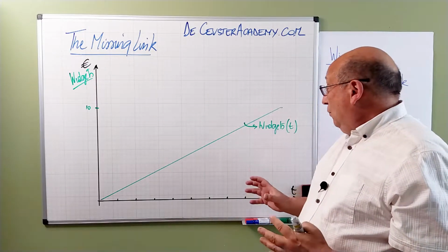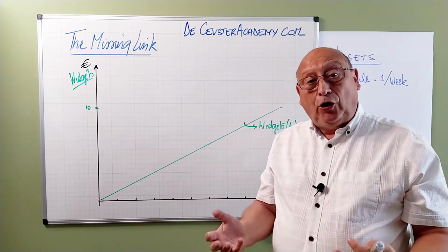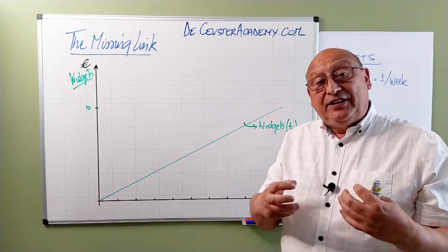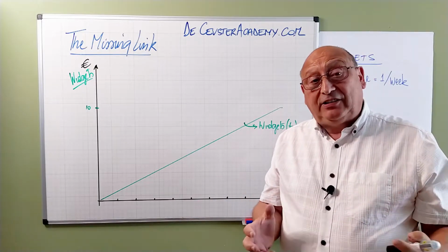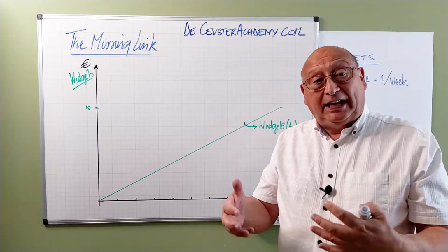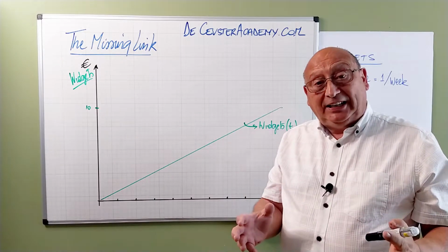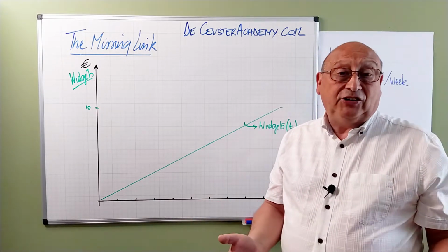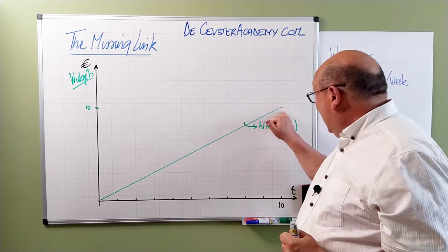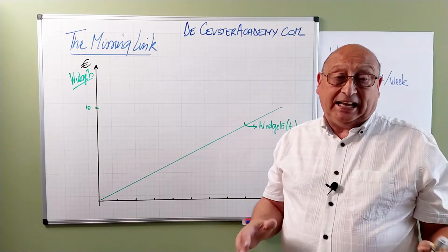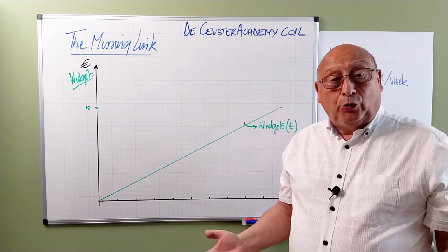These elements are very important to understand because basically what we're doing in our project, when we're determining all the planning and everything, the activities are creating deliverables. And every time we create a deliverable, we put that in the schedule. That's how we do the planning. And in our case the widgets are the deliverables. So our schedule says I want to make in 10 weeks 10 widgets, and those 10 widgets are made at a rate of 1 widget per week.